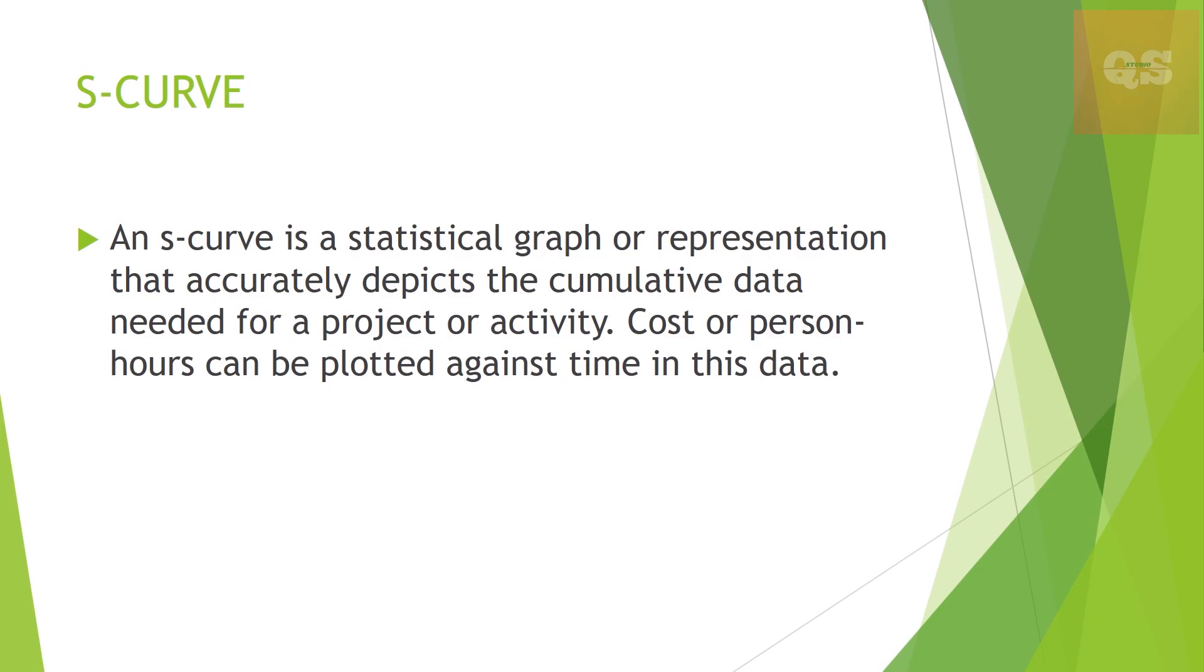This is how an S-curve is plotted before the beginning of a project. Once the project starts, when the actual costing or the actual man-hours is carried out, that is also plotted and it is checked whether the shape being formed is compared with the S-curve that was prepared during the post-contract stage.